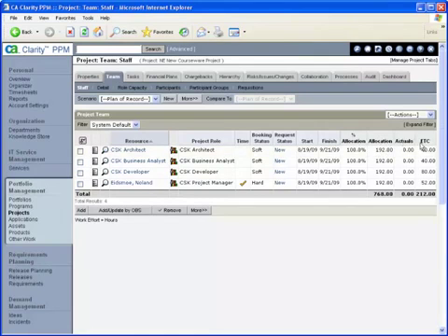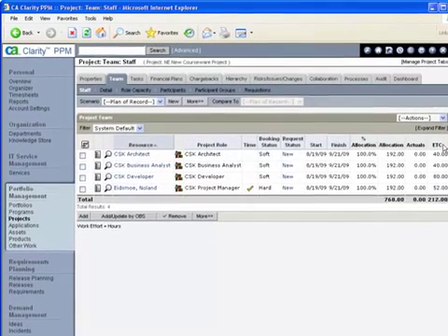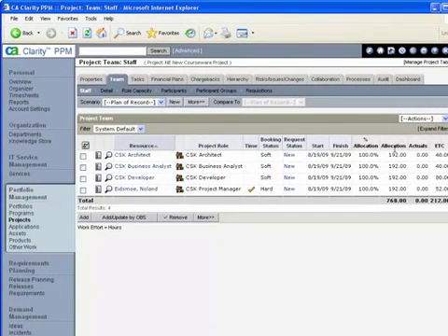The next one is this last column, ETC, and that is the same as assignment, or more fully, assignment ETC. And that comes from assigning roles or resources to tasks. In order to assign a role or resource to a task, they must be allocated to the project, meaning they have to be on the page that we're looking at. Then we can assign them to do work through a task. And that term is called assignment ETC in its fullest term.